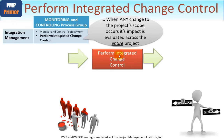The discipline here is that whenever a change is raised, it is always evaluated across the whole of the project. You'll remember the project management plan with its various plans within it — schedule, cost, quality, and so on. Every single change will be evaluated against all of those aspects so that an understanding of the true impact, should the change be implemented, is fully understood.